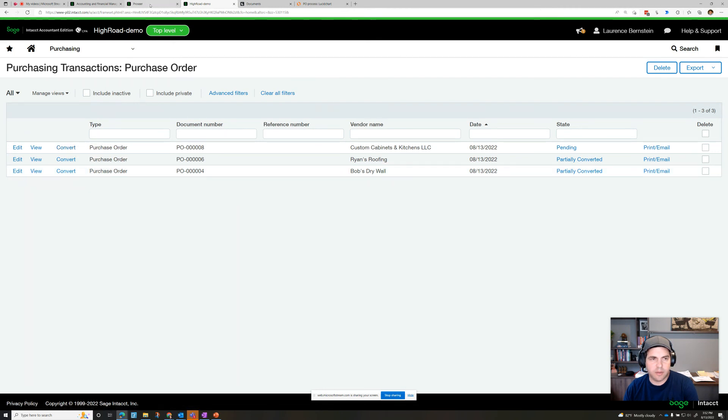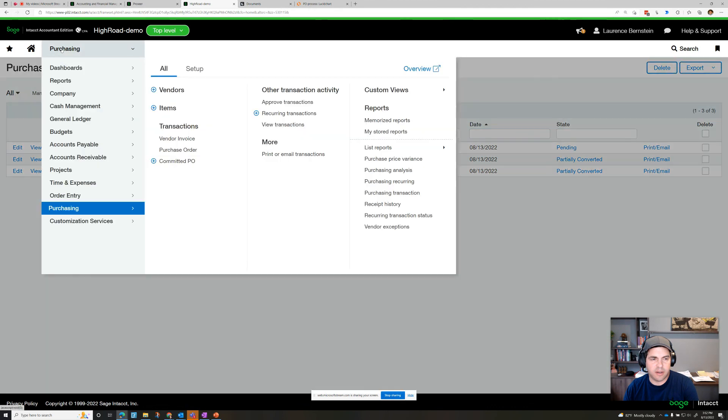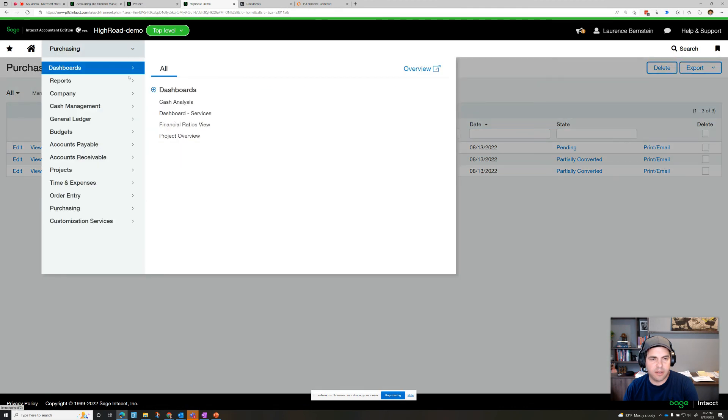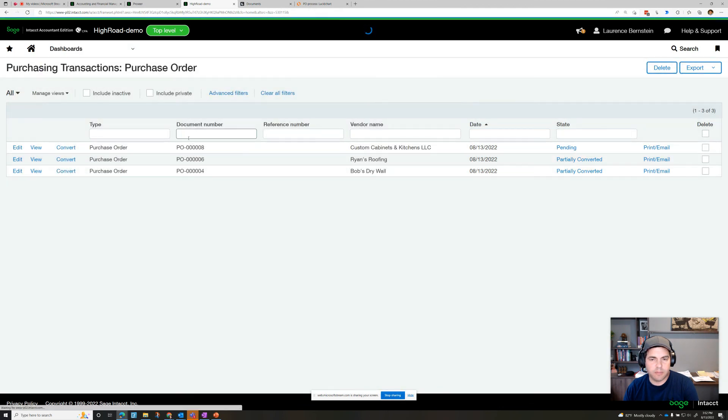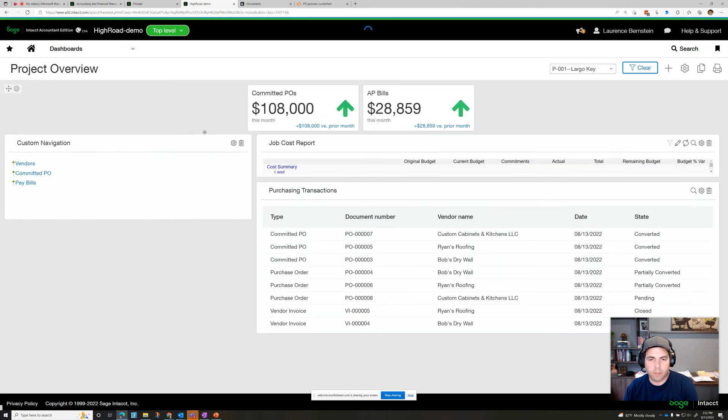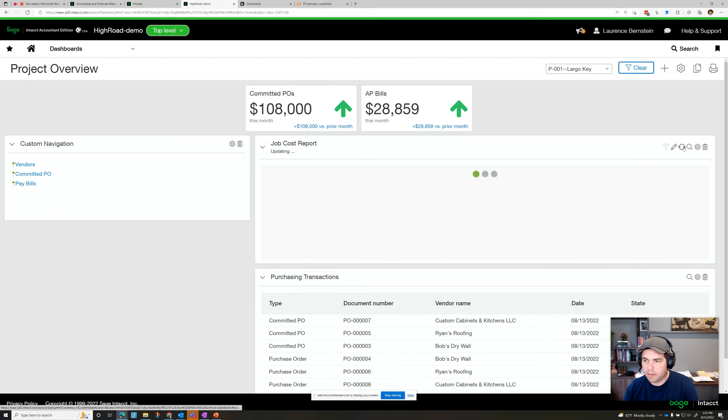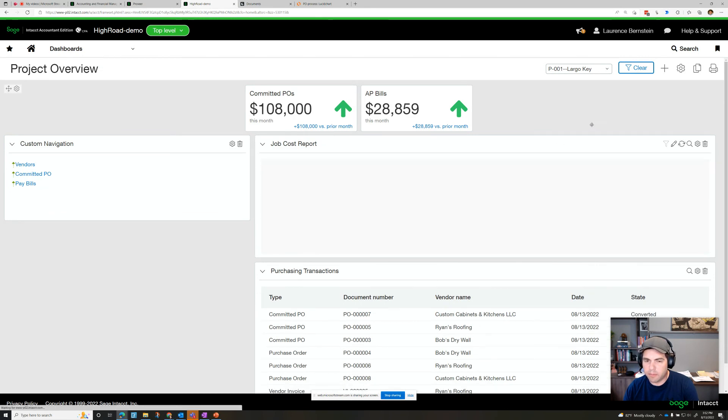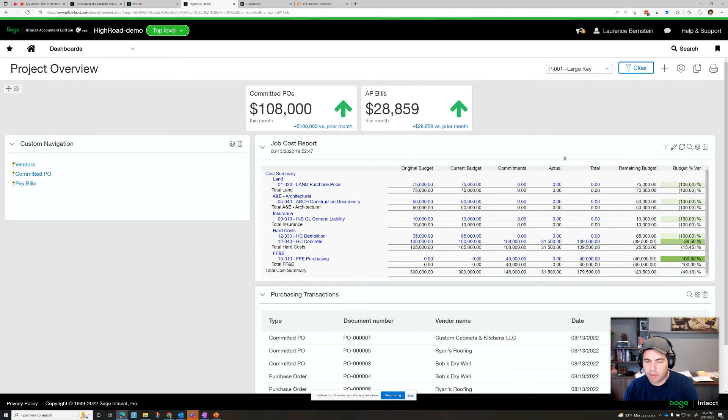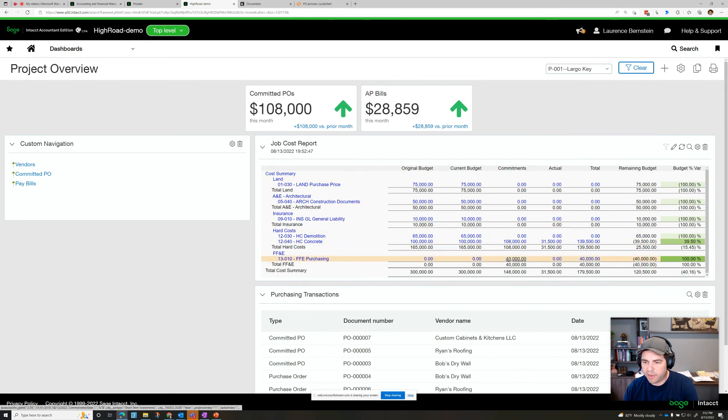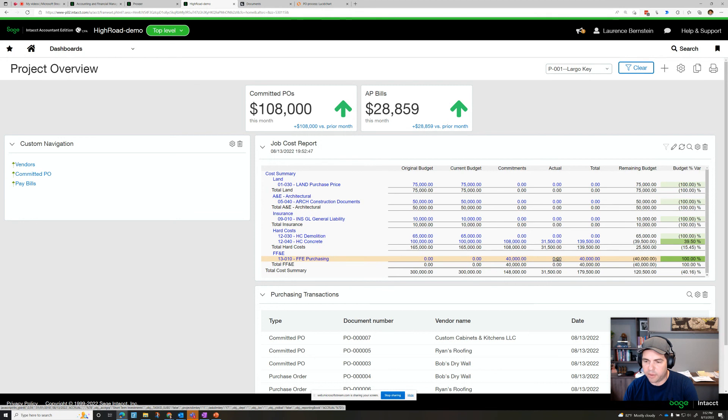And if we want to see what that looks like then on the reporting, we'll see that here under FF&E purchasing, we now have a commitment of $40,000 and no actual spend because it has not been converted yet to a vendor invoice.